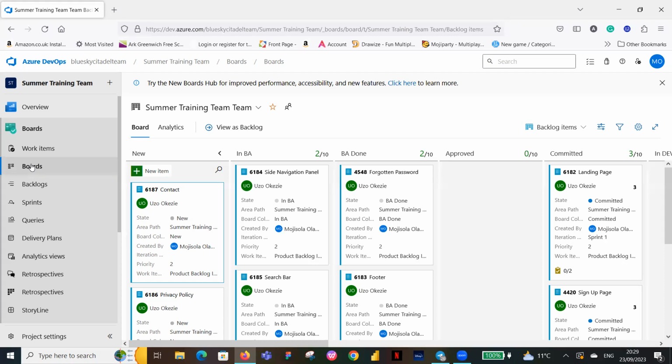But in a plain scenario, are you going to be paying the QA during the week they are waiting for the developers to finish? Yes, you're going to be paying them, so they have to be doing something. They'll be getting ready their test plan, writing their test cases and everything. It's like preparing before the baton gets to you. So by the time the baton gets to them, they just delve into work, analyze what they need to analyze, raise their bugs and all that. So it's a continuous cycle.